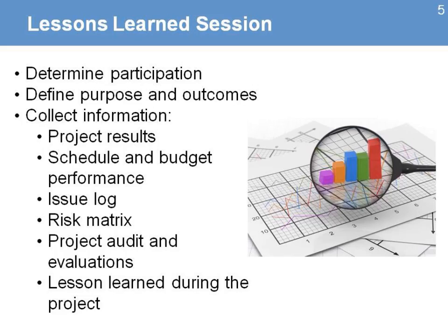For the lessons learned session, when we begin the process to determine what's going to be our content, we first need to determine the participation. These are the team members or key stakeholders that will be invited to this session. And they're invited because they can contribute to the lessons that we need to capture. We also need to be clear about defining the purpose and the outcomes of this session.